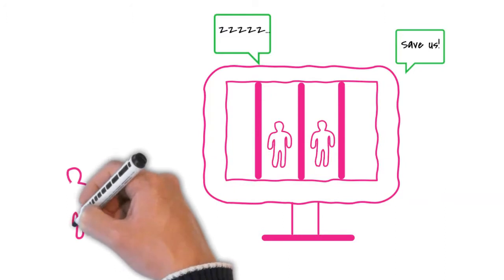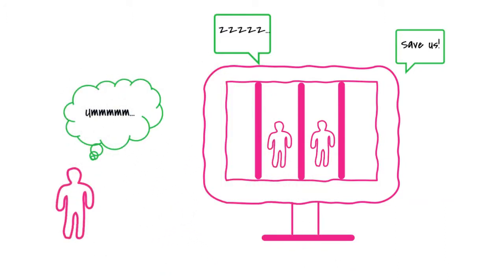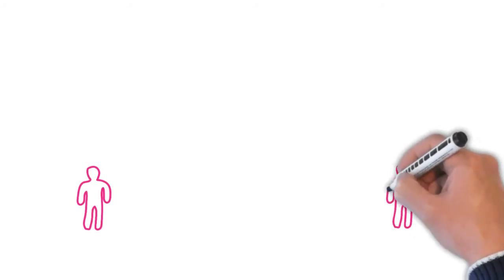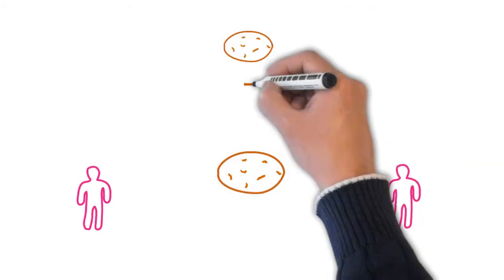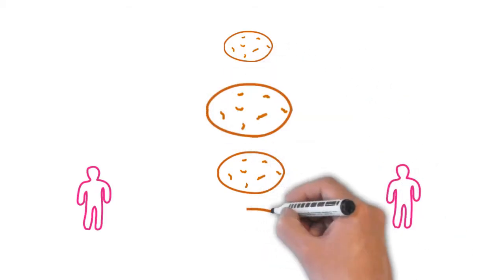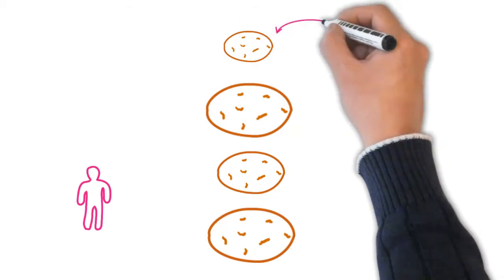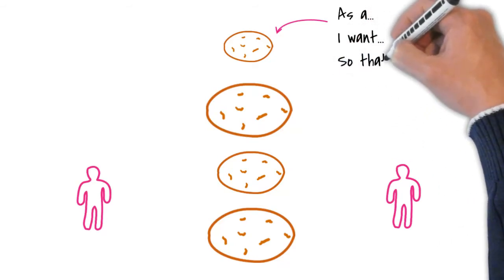More importantly though, the product owner probably doesn't yet fully understand their responsibilities, and they might need some coaching to play their role really well. In advance of sprint planning proper, help them to order the backlog. What work is most important to get started on now? What's going to reduce risk and uncertainty? Also, if the user stories in the backlog aren't clear, help them to clarify them so that when the team starts working on them, they know who the work is for, what they want, and why.